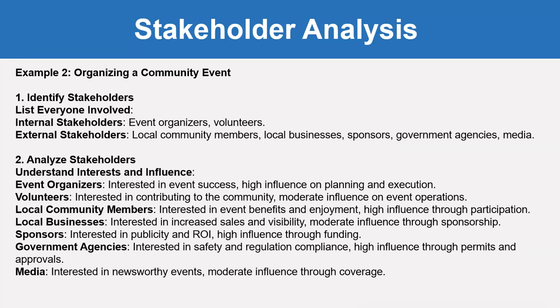Here, friends, the first thing is to identify stakeholders. The event organizer and volunteers are the internal stakeholders, and local community members, local businesses, sponsors, government agencies and media are the external stakeholders. Then we have to analyze these stakeholders. For example, event organizers are interested in event success, with high influence on planning and execution. Volunteers are interested in contributing to the community, with moderate influence on event operations. Local community members are interested in event benefits and enjoyment, with high influence through participation.